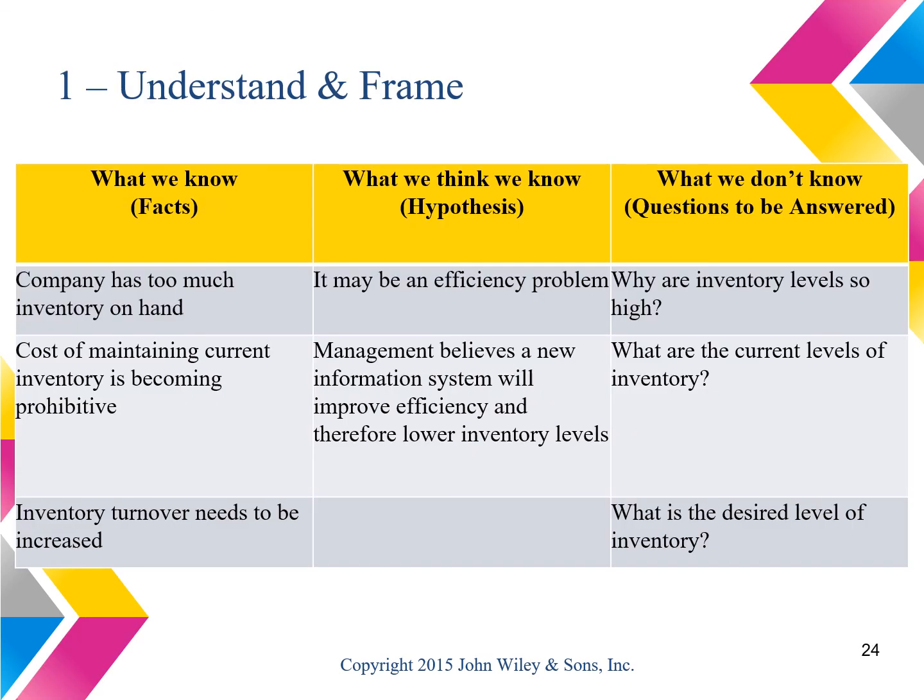As you face a new project, a problem or an issue, you need to first understand it. This usually entails capturing what you know, which are the facts, what you think you know, which are the hypotheses, and what you don't know, which are questions to be answered.